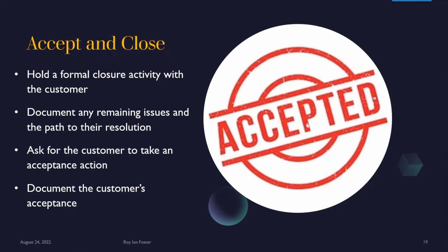Sometimes a customer may refuse to take acceptance and you may need to document that. Your organization may have a process or a policy in place to do that. You certainly want to document if your customer is saying, I don't agree that we're done, and your organization may say, well, we feel like we are. But it's important to just document that, and if you can, to garner that official acceptance from the customer. It's a really good idea to do that. And again, your organization may have a formalized process to do that.